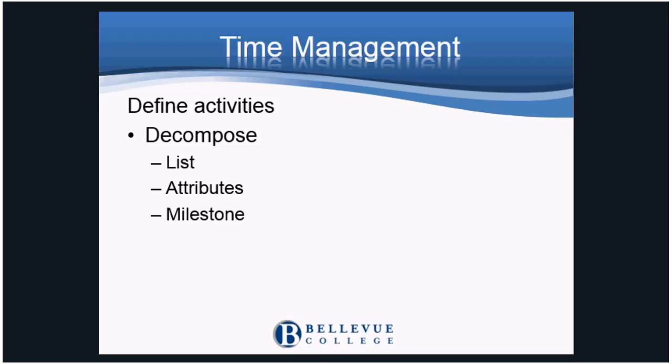of things that need to happen, like an approval, that are not defined tasks with a specific amount of project time and resource to complete, but a placeholder for an event to occur. A milestone may also be set to identify completion of a connected set of tasks. For example, completing all the preparation steps in our pie may be a milestone.